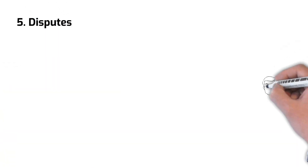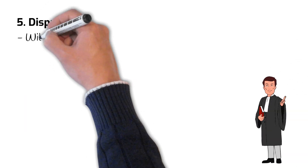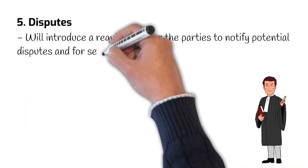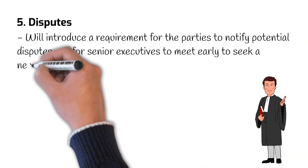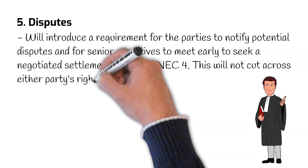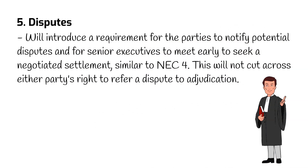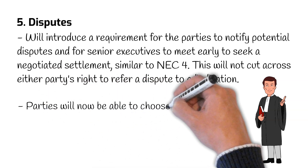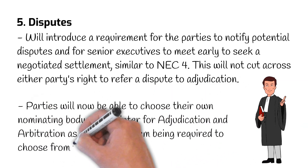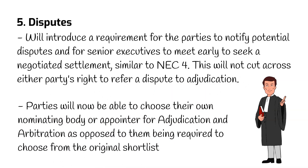Number 5: Disputes. The new editions will introduce a requirement for the parties to notify potential disputes, and for senior executives to meet early to seek a negotiated settlement, in an approach similar to what is set out in NEC 4. Importantly, this will not affect either party's right to refer a dispute to adjudication at any time. Parties will now be able to choose their own nominating body or appointer for adjudication and arbitration, as opposed to being required to choose from the original shortlist.